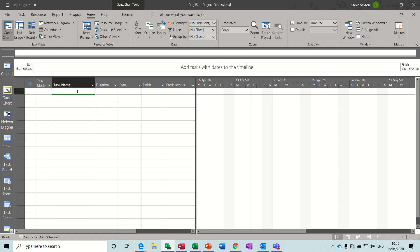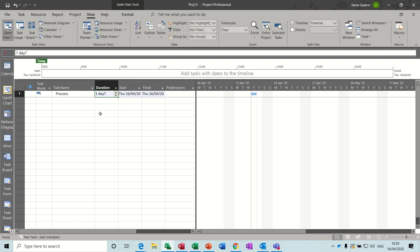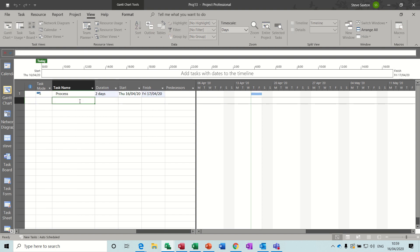This is how you do it. First of all I'll call it process, and let's say it's a two-day process which repeats three times. So there's your first one, now I want it to repeat on Thursday and Friday for the next two weeks, so three all together.